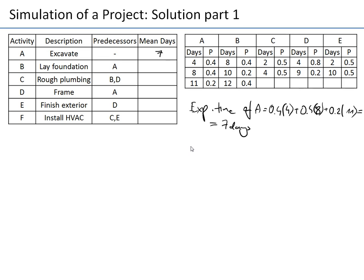We repeat this for activities B, C, D, E, and F. For F we know it's exactly five days. For the other activities, the computed mean durations are: 10, 3, 5, and 6 days respectively. Now we use the Critical Path Method with these mean values as if they were exact, not expected, numbers of days.